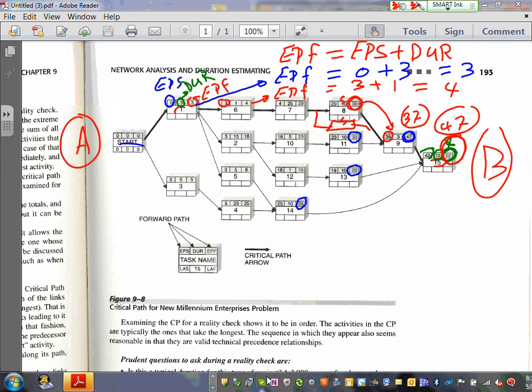If you take longer, that will screw up the duration of the project. Either way, guys, if the critical path takes longer, it's going to screw up the duration of the project. Or if you have to work overtime on the weekends and charge more, like in construction, if you're bringing the electricians on Sunday and Saturday, you're going to pay an arm and a leg for those guys. So instead of doing the overtime that makes you pay more, or allowing longer time, which screws up the duration of your project and gets you penalized, one idea in our industry is to have more support.